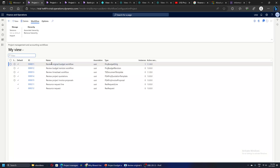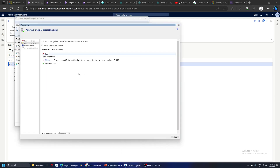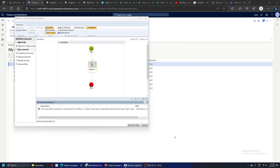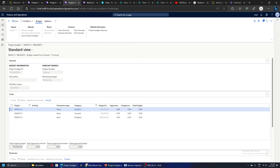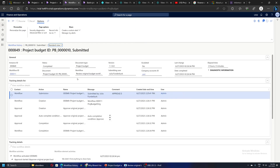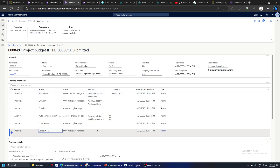This is the Budget Review Original Budget workflow. I have modified this workflow so that it is automatically approved. If I go to the settings of this workflow under Automatic Actions, I have created a condition which is: project budget total cost for all transactions is greater than or equal to zero USD. If this condition is met the budget is automatically approved. Let's go to the project budget and check the status - the workflow is complete and the project budget is approved.